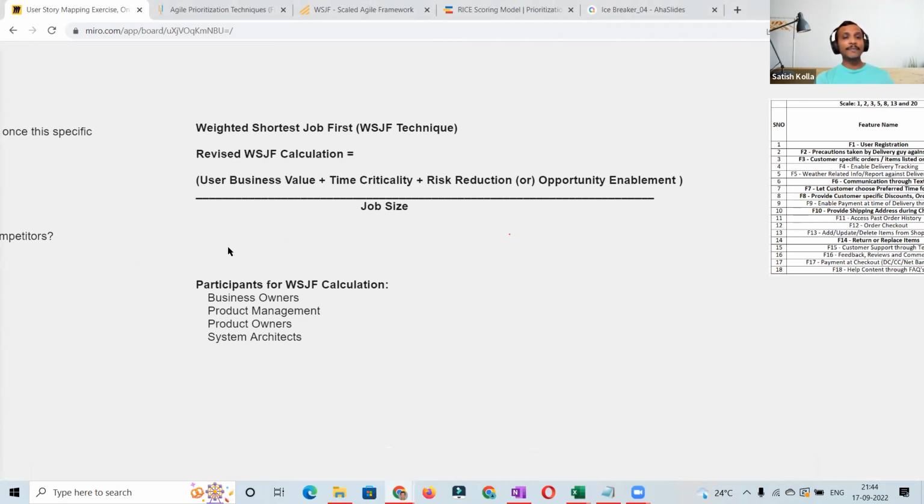And to answer Manika's question, the participants who will be involved or invited for this WSJF calculation will be the business owners, the sponsors or the executors of the project, the managers at the organization level, the product owners, and the system architects. Why system architects? Because they are the ones who could help us with the technical aspects, the technical limitations, issues, and challenges. That's the reason even the system architects are involved, again from the design and the implementation perspective as well.